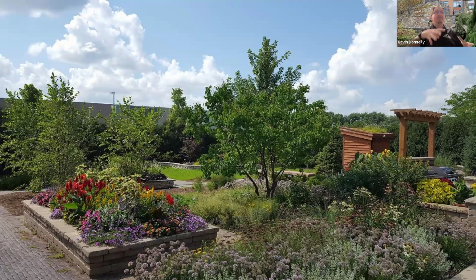What do we have available to us now that we can use for this project, as opposed to saying it's got to be the exact same thing that happens to be available in New York that doesn't exist here in Illinois, like granite, for instance, right? And that's not on most things, but we don't have a lot of granite in the Midwest. It obviously exists on the East Coast. So if that's a hard and fast rule on a spec, it's going to be very difficult to actually perform that job.